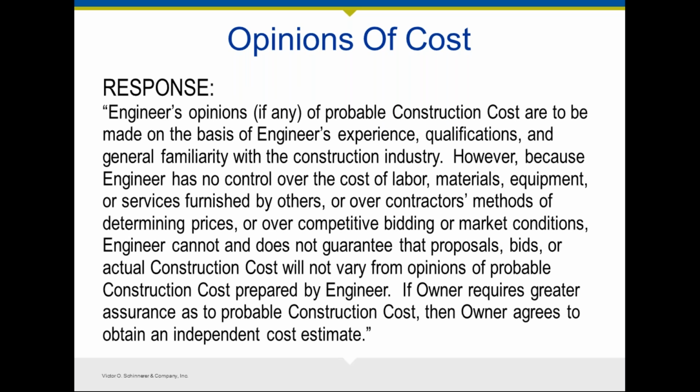They use the term probable construction cost based on your experience, qualifications, and general familiarity with the construction industry. And so you can review the clause and see where you want to be in terms of defining what your role is. If the client wants further assurance about what the cost is going to be, then you certainly want to direct them to a specialized consultant who can provide such services, or you can provide those services too if you feel like you're qualified to perform those services.